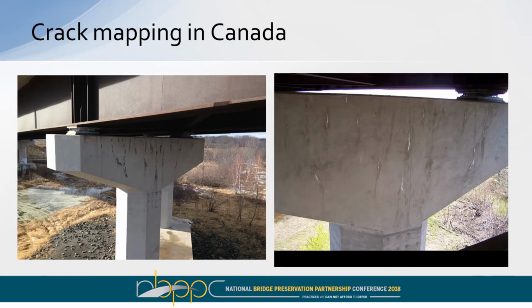So here's an example. We're currently scheduled to do it this summer, but again, just to give you a case study, this is a bridge in Canada where they have a lot of cracks on all of their piers, and the visual inspection costs were just shooting through the roof. So they called us, and we looked at the area. We determined that it would just take 2 men on a boat for about 5 days to model, I think it's 46 piers on 2 different structures.